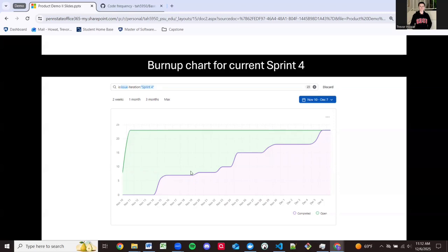I would have liked to see a little bit more of a step here or there. However, you can always see a flat at the beginning of the sprint. This is typically because sprint planning is taking place and tasks are just being started. They're not closing quite yet, and that's why you see that gap there. Then the first set of tasks start to close out. They had some rollover from sprint 3, and that's what's closing here. The reason there's a big jump is that there was a little bit less work to do for those, so they all closed out at once.